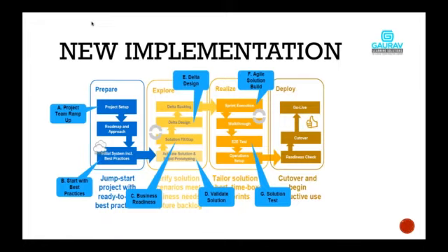After fit and gap, you will create a data design document. Now, what is a data design document? This is nothing but the FS, functional specification, and technical specification. So you identified there is a gap, and here you are trying to specify how you are going to fill that gap. Let's take a practical example.